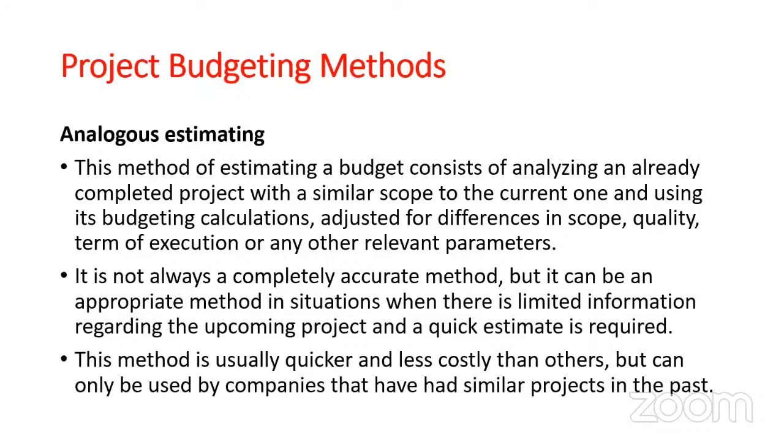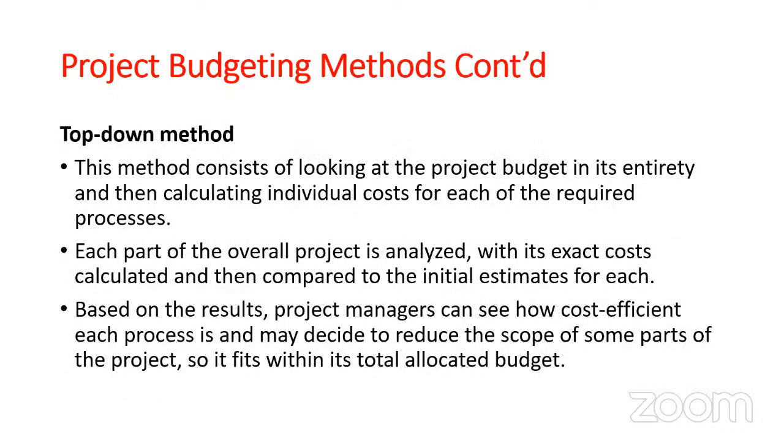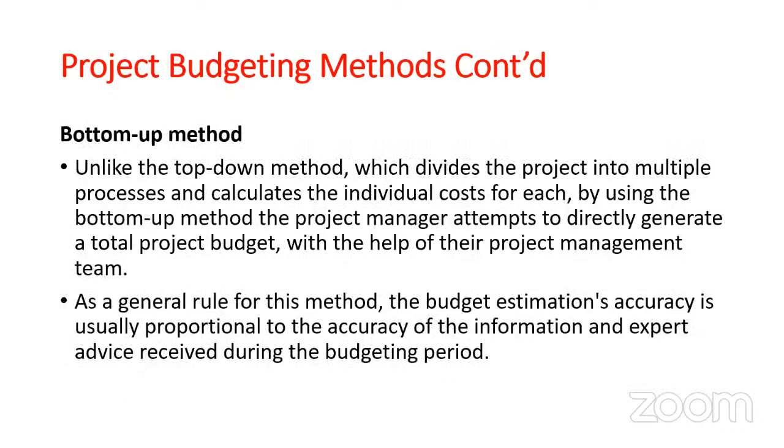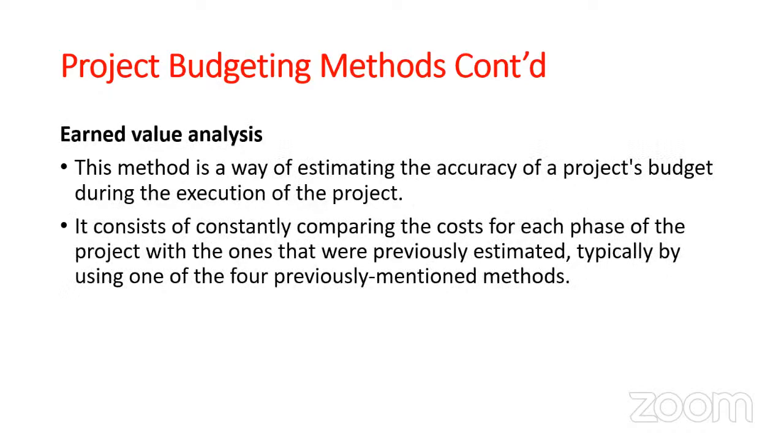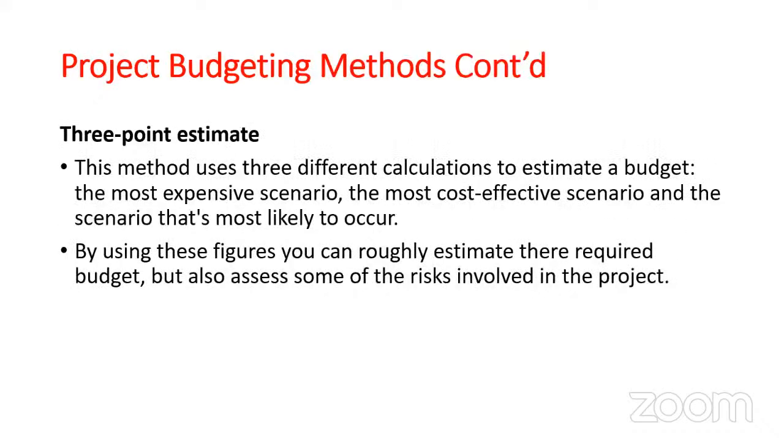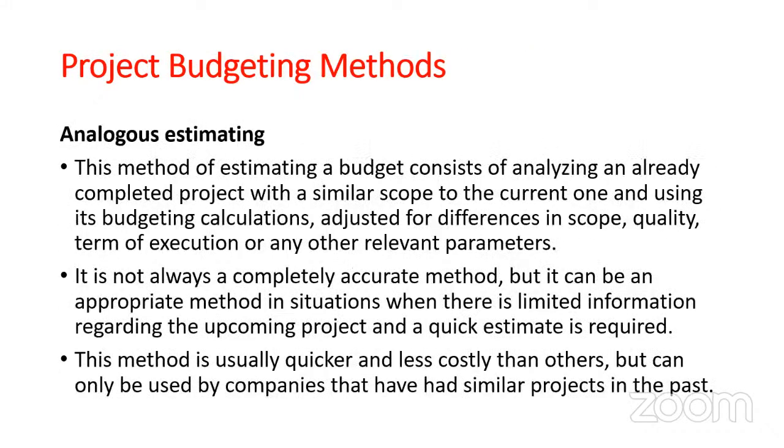Now, budgeting methods. You have analogous estimating. I recommend that when you get your materials, please take the time to read through these, but basically, I will explain them. Analogous is developing a budget based on similarities. So maybe you did a project A, and then you have a similar project B, and you're drawing your budget based on what happened in A.